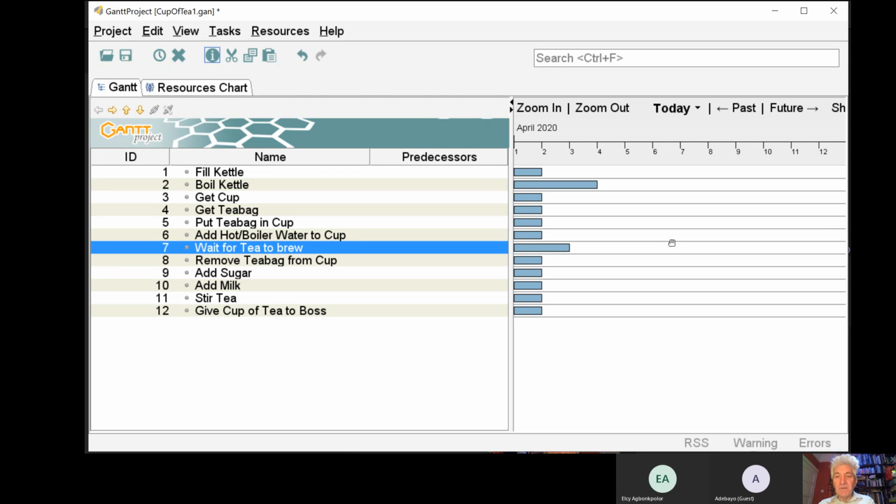So what that means at the moment is that our plan is basically invalid, because we have more than one task being done in that same first minute. And because we haven't shown any dependencies, our plan won't work, because this shows that we are going to remove the tea bag from the cup at the end of the first minute, but the kettle hasn't even boiled.